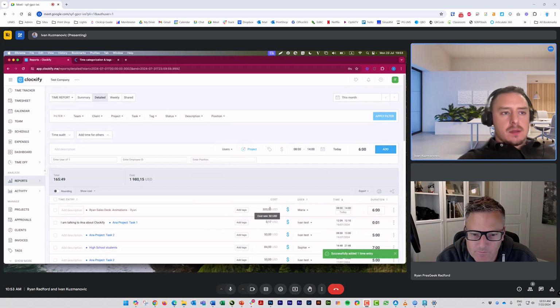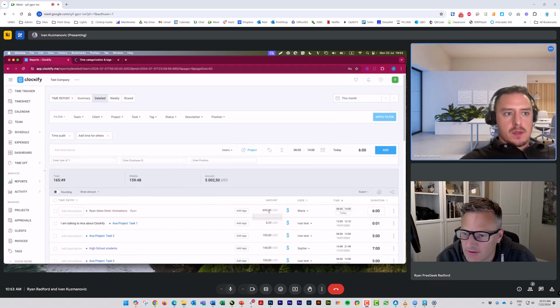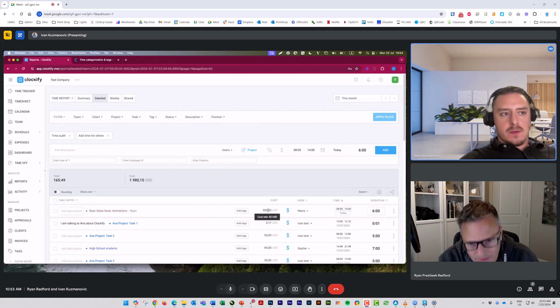So this added Maria's time, correct? And we have 6 hours. We have the option to show the amount. 100 is the billable rate. Show cost. Cost rate is 50, so that's what I paid her, 300. And show profit. Profit is 300 because billable and cost rate are this.